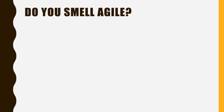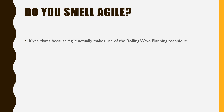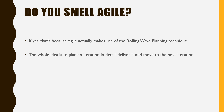Do you smell agile in this entire concept? If yes, that's because agile actually makes use of the rolling wave planning technique. In traditional project management we do use agile to a certain extent. The whole idea is to plan an iteration in detail, deliver it, and move to the next iteration — that's the idea of agile. Here you're planning in detail, completing the work package, and then moving on, eventually delivering the entire project as a whole. That's traditional project management. Do you also see shades of prototyping here? Let us know in the comments.